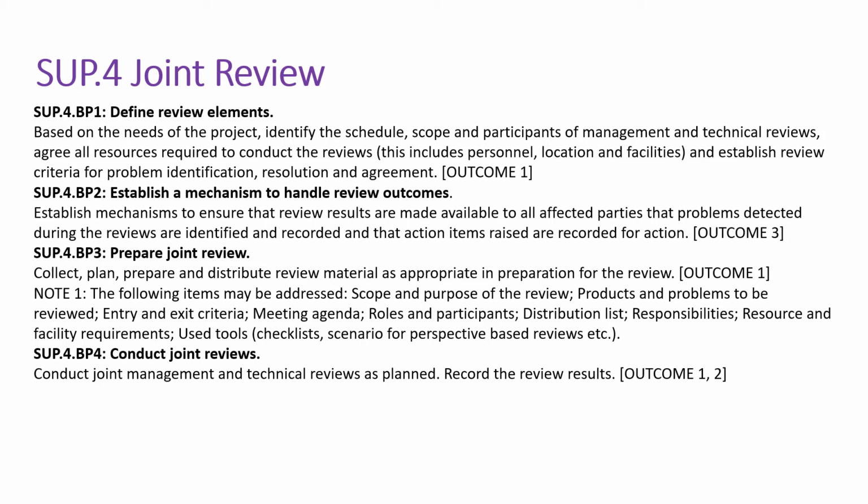So your BP1 talks about define review elements based on the needs of the project, identify the schedule, scope and participants of management and technical reviews, agree all resources required to conduct the reviews, and establish review criteria for problem identification, resolution and agreement. So this is simple. We need to define the frequency, what needs to be reviewed, who all the participants of the review meeting are, and when to conduct the review meeting.